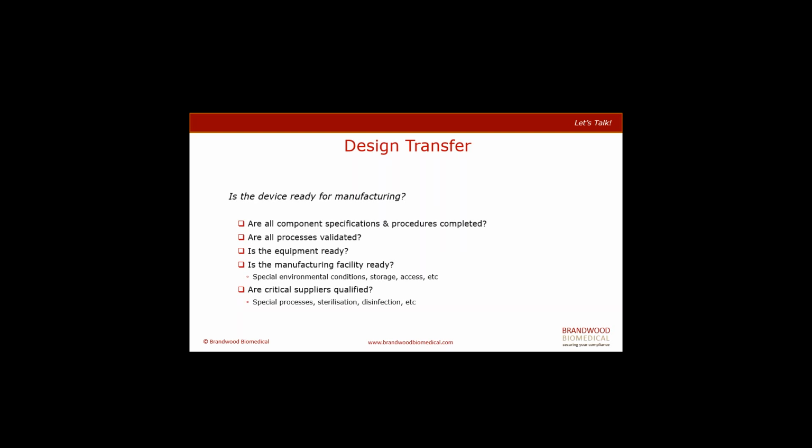Design transfer. Is the device ready for manufacturing? Some checkpoints for this. Are all component specifications and procedures completed? Are all processes validated? Is the equipment that you are going to be used for manufacturing ready? Is the manufacturing facility ready?